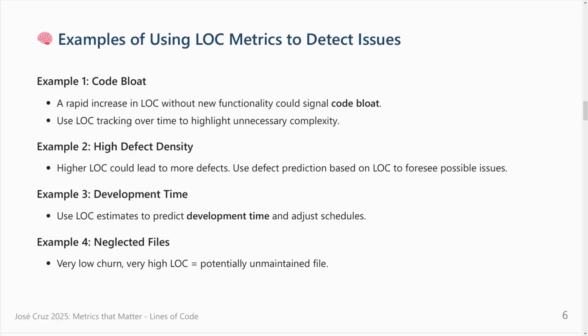So somehow, by the increase of lines of code, you can guess how much time the project will take, because you can guess somehow what will be the range of the size of this project. You cannot say that it is 6,000, but maybe you can say between 5 and 7. So you have a range, and with this range you can even have another range to say the project will take between 4 and 6 months. And that's better than having nothing, right?